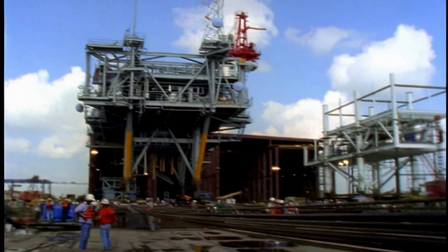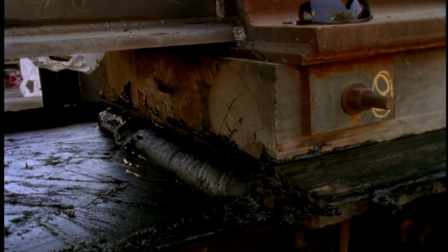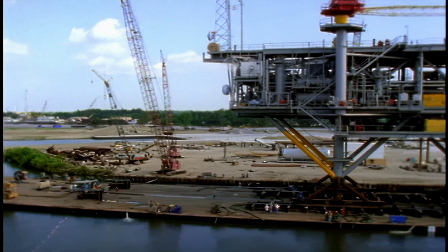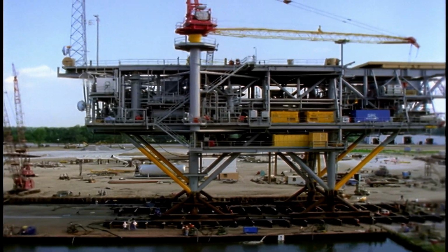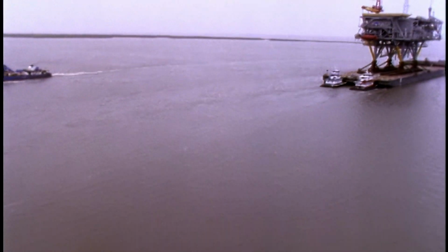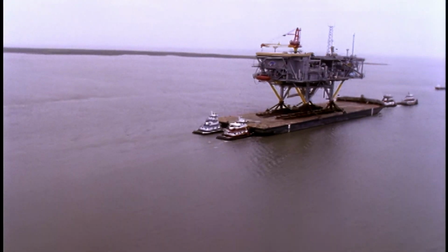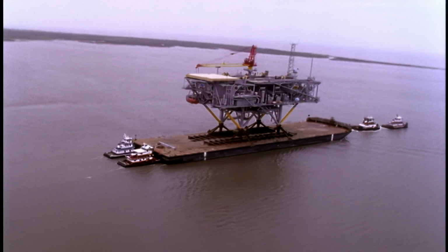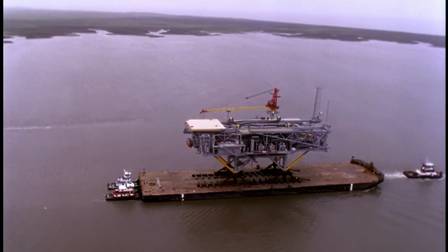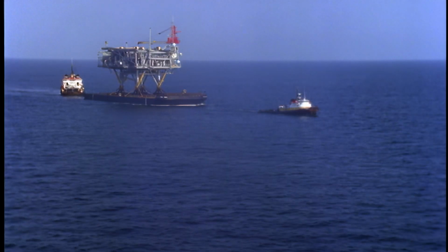The transportation barge is readied for loadout. Topsides are pulled onto the barge on greased skids. After waiting 2 days on tropical weather near shore, the Spirit topsides sailed from Unifab on Monday morning, June 29th. The tow to the Spirit site took approximately a day and a half.